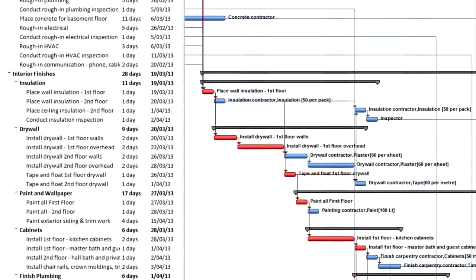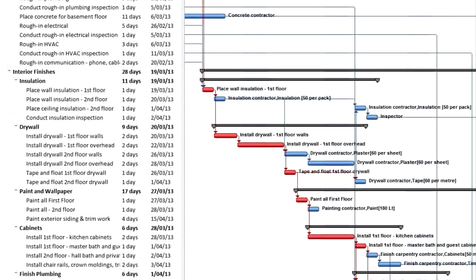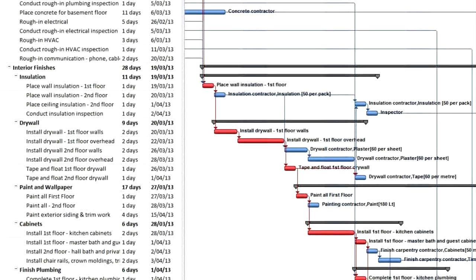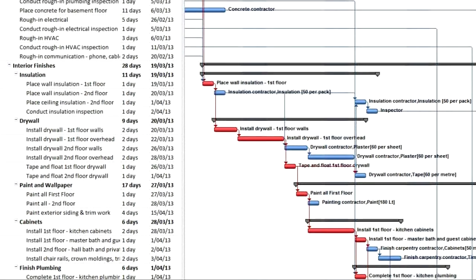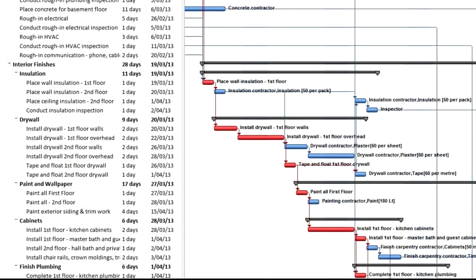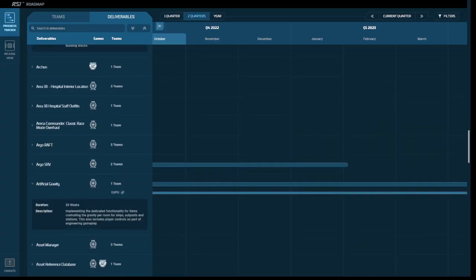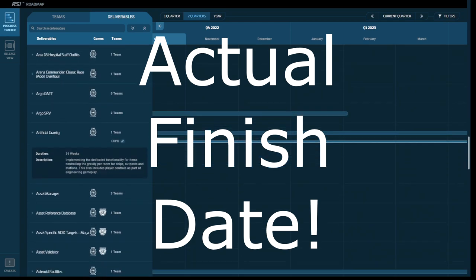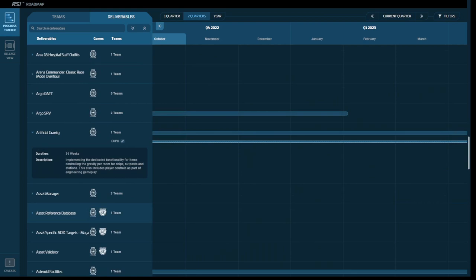But if you do do the effort, you can find the critical path, apply a reasonable length of slack time, calculate the cannot start before and must end time for every task on the list, and calculate, hold on to your socks, an actual end date. But if you don't do the work, you not only don't have an actual end date, but you can't. You're just making gut guesses.